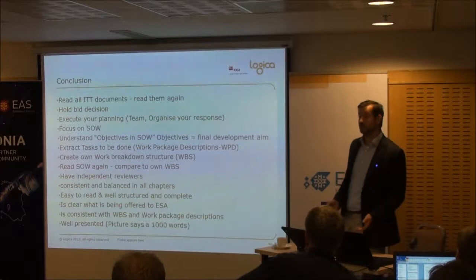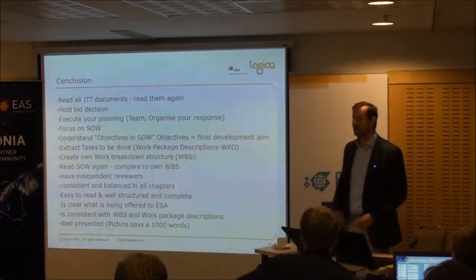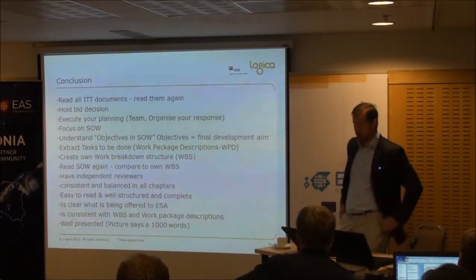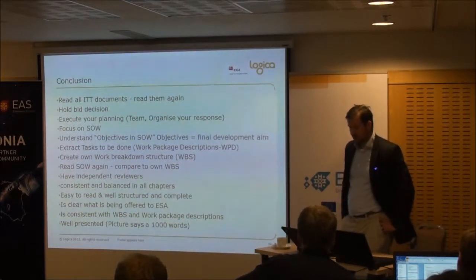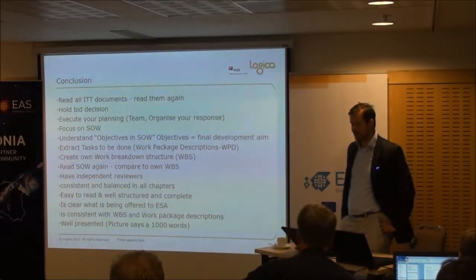There will be a statement of work, no doubt, but it will be different. It won't be explicit, I want to do A, B, and C. It'll be, bring your idea and structure it in this kind of way or that kind of way. Be clear of the exact tasks you're going to do. Have a very clear work breakdown, which you can evolve into clear work package descriptions later.